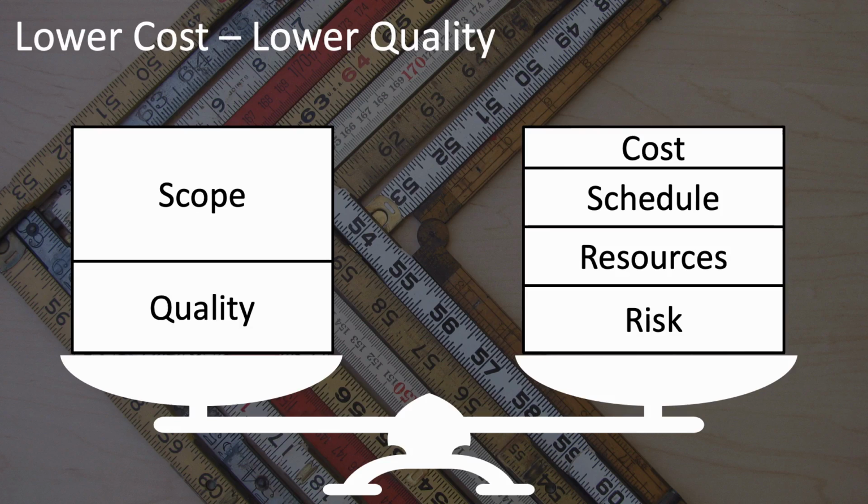Whatever you do, try to avoid trade-offs that create bigger problems later after the project is completed, because those problems tend to be hidden and can be much higher than anticipated. For example, not maintaining your equipment properly can result in poor performance and breakdowns later on. Or going with lower quality equipment and facilities can cost you more in maintenance costs later and introduce greater safety risks.